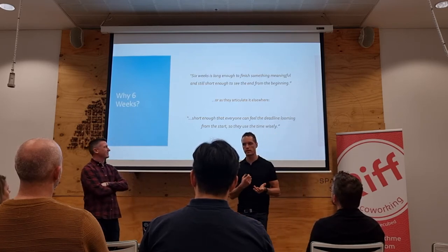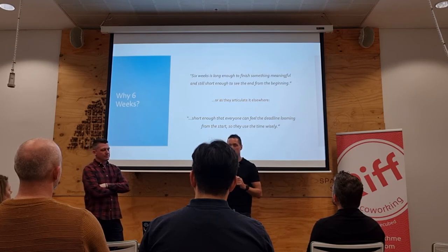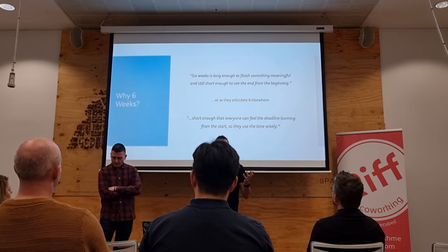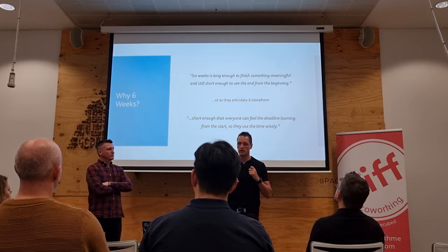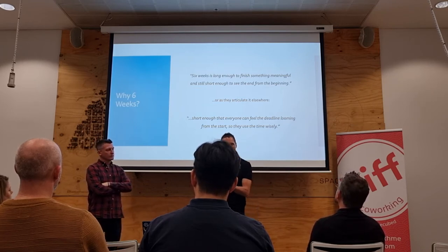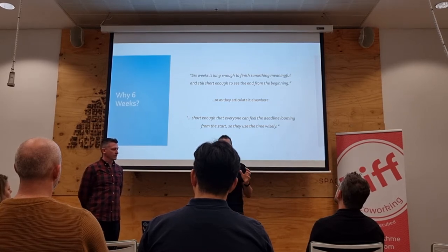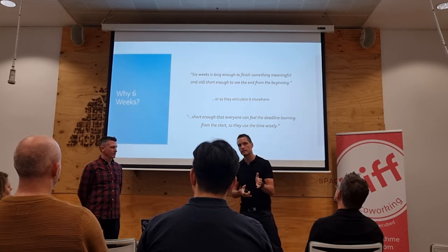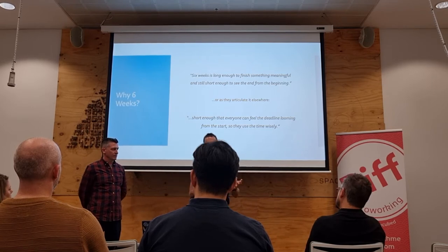So why 6 weeks? Well, planning is costly, right? And doing that planning every 2 weeks can start eating into efficiency. So there's a lot of overhead. When you look at all the ceremonies, like sprint planning, estimating, retro, showcases, you have to get the timing right between those 2 week sessions. This was all compounded by not being able to walk away from it: you get to the end, like Friday of the second sprint, and there's still a little bit to go. You bring that baggage over with you to the next sprint.